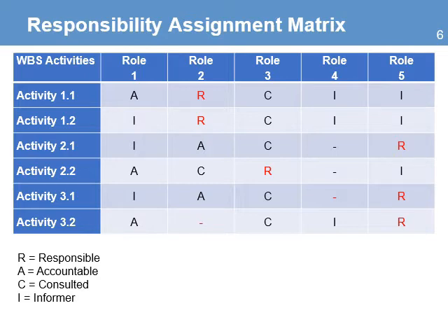The other role is accountable. There must be one person who is accountable for each activity. In most cases, it will be a project manager or a technical manager. It is the person who has a level of authority and makes sure that the activity is completed according to the quality requirements. There can only be one person who is accountable. It is part of quality assurance to make sure that those that are responsible for the activity have someone who is going to supervise and monitor that activity is completed according to the plans.